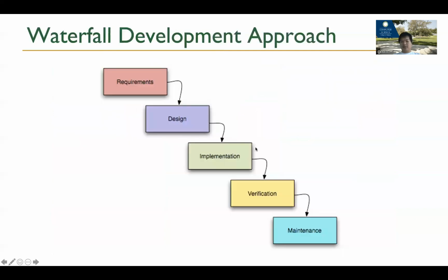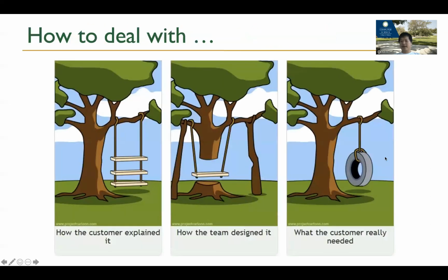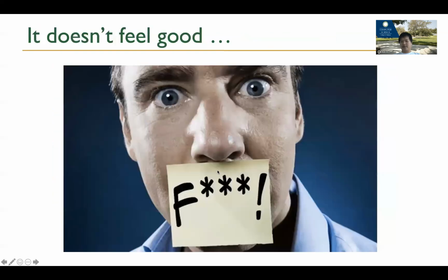So that's why if you do this kind of approach, even though you might think you have a very decent and solid requirement design, and then you do the coding and testing, the risk actually sits after you do all the testing. Because at this point, remember I told you, it's already like a year past. You spend the whole year on this project, then you hope the customer will like it and start to use it. But at that time the customer tells you, oh, actually, you know what, I'm actually needing something like this. Or you are doing something like this and it's not what they want. All right. So either way, it really sucks.